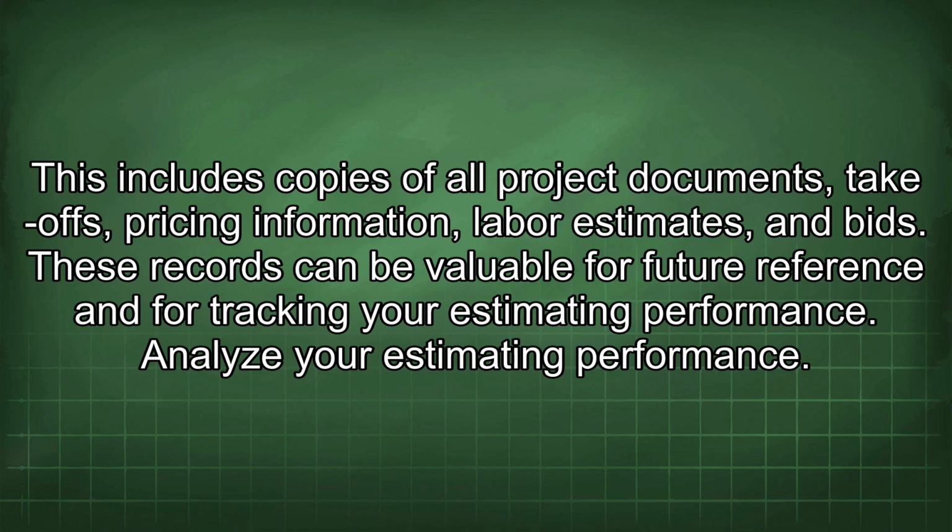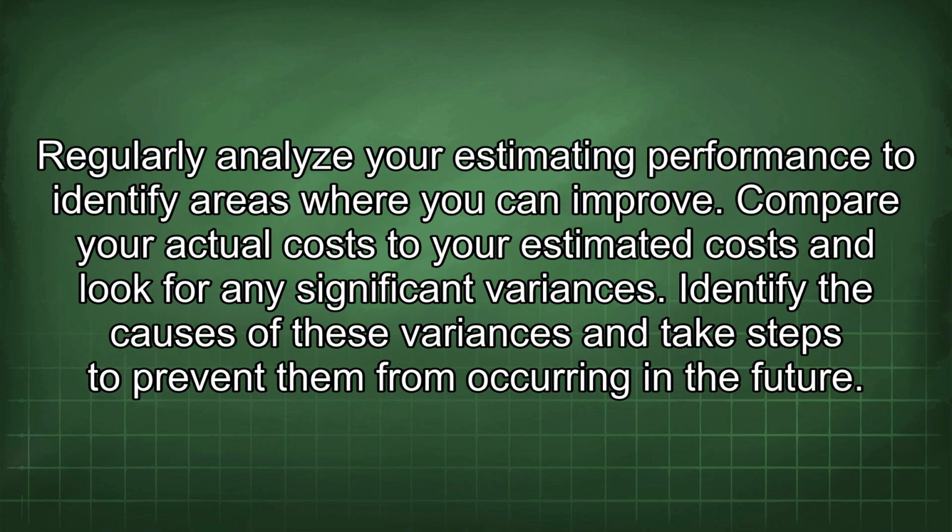Analyze your estimating performance. Regularly analyze your estimating performance to identify areas where you can improve. Compare your actual costs to your estimated costs and look for any significant variances. Identify the causes of these variances and take steps to prevent them from occurring in the future.